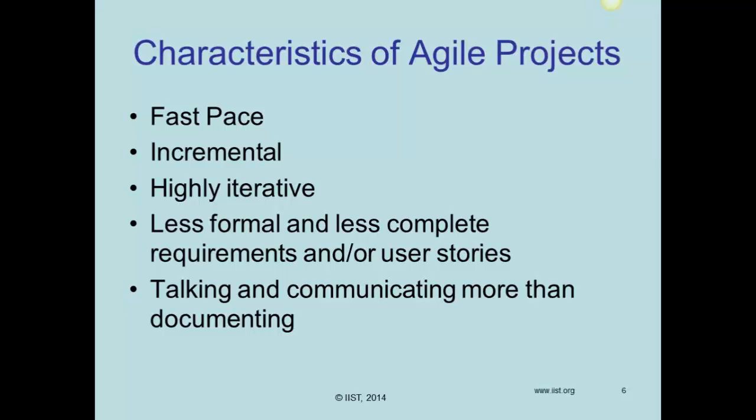Each sprint or each increment would have a number of features that we focus on. Now, of course, the length of the sprint, as you know, is different from one project to another. Some people say it needs to be 2 weeks. Some people do it at 3 weeks. Some people do 4 weeks. In fact, I don't believe that the Agile framework has defined the length of an increment or a sprint. I do Agile projects. Some of my Agile projects are 1-day increments, and some other Agile projects are 3-month increments. And this is the flexibility of Agile.